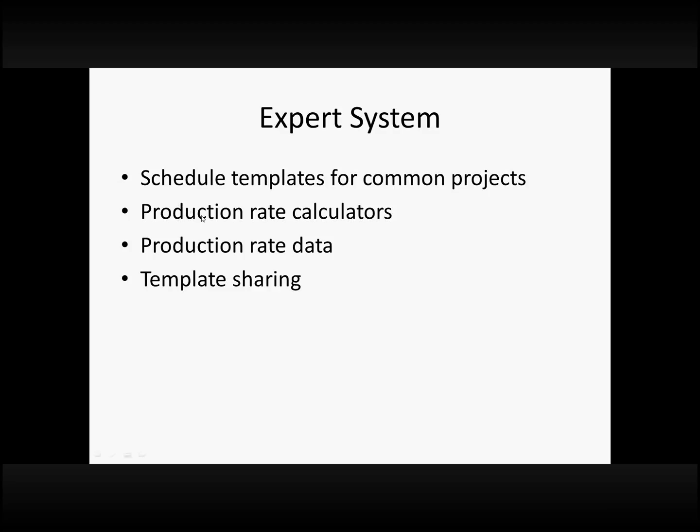We tried to get as much information as we could to help determine production rates, but in some cases, we put in some simple calculators, based on different parameters, to help the engineer who is trying to determine the duration calculate what it would be for a project. And then we assembled production rate data from various sources to also provide that in the tool.